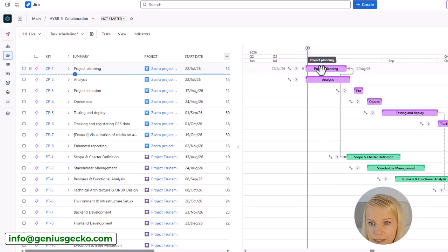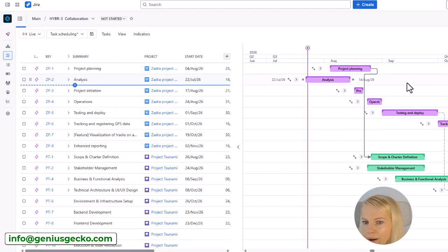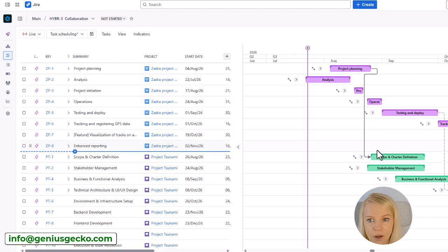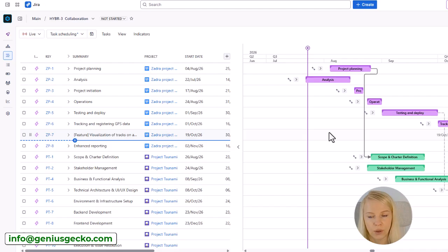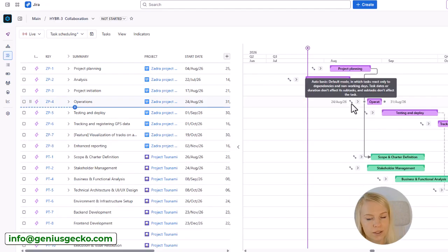other moving pieces. So in this case, let's say project planning is going to be delayed by a few days. It's going to move some other work items automatically. It can be risky. You have to be really aware what is happening inside, how your setup looks like, and beware that those examples are actually simple examples, right? We can build something much more complicated and it can be like a whole setup just for you.